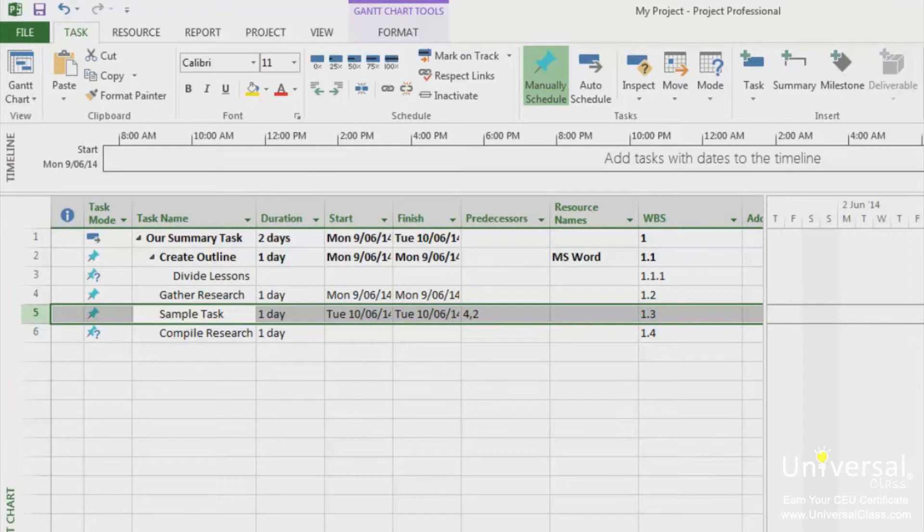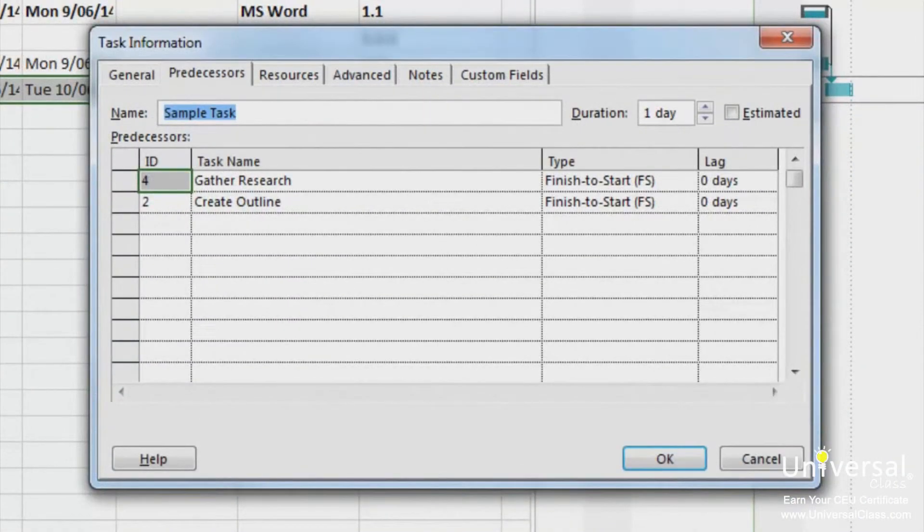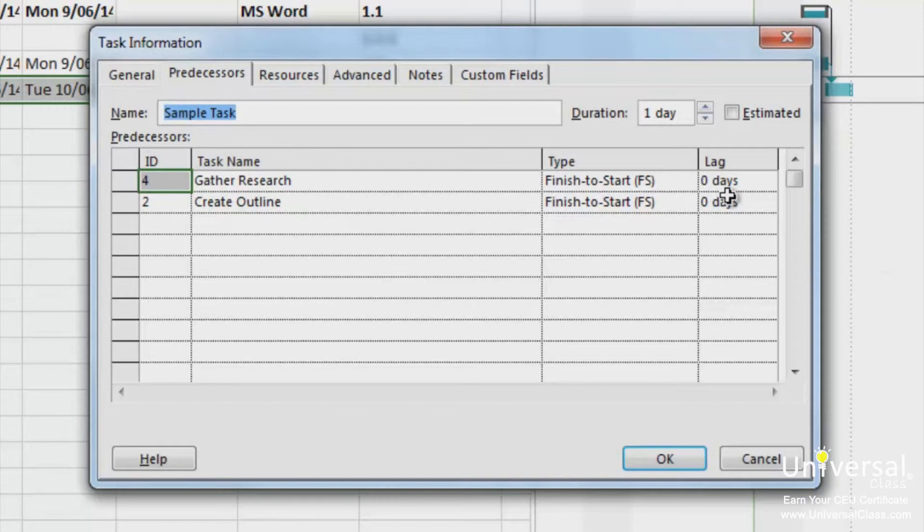To set lag time or lead time, double click the name of a task to open the task information dialog box. And click on the predecessors tab. The field where you set lag or lead time is in the lag column on the far right. This is located to the right of the dependency type column that we learned about just before.